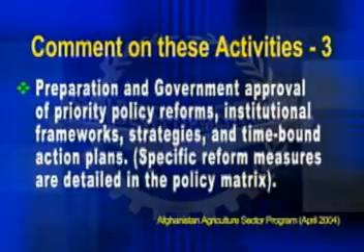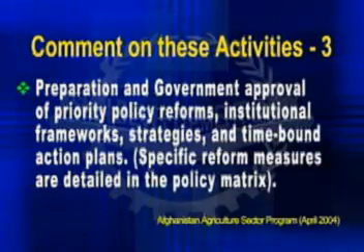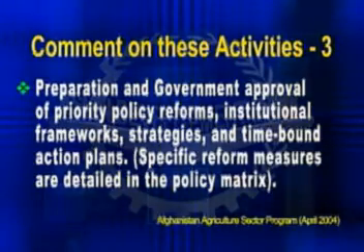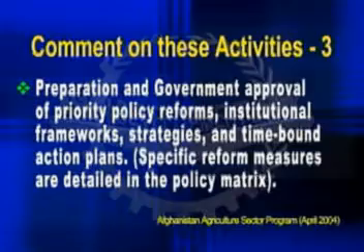My thoughts on this activity statement is that it's not particularly helpful. It doesn't add value in terms of defining the key milestone events along the way to successful implementation of this program loan. For example, under a program loan, legislation is often required to be passed. Now, legislation has to go through a series of steps. It has to be drafted, there has to be a consultation process, redrafting occurs, it then has to be passed by a legislature or parliament, and it then probably has to be gazetted before it finally becomes law. Now, these various steps along the way can be seen as the important milestone events which will help us track whether this program loan is going to be implemented according to the planned schedule or not.